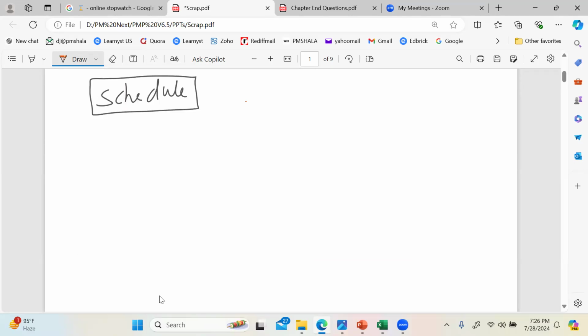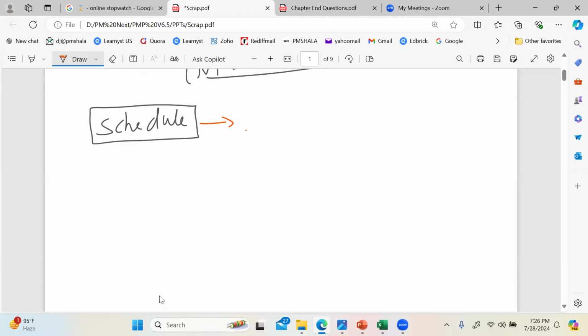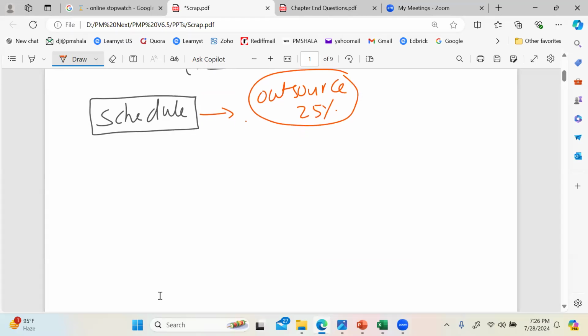Let's say the response is, I'll tell you what response. We decided to outsource 25% of the work. See, the idea is if we were to do it all alone, we may not complete on time, right? So we decided we'll do 75% of the work in-house and 25% we would outsource. I hope you appreciate this has resolved the risk, reasonably. We should be able to complete on time now.